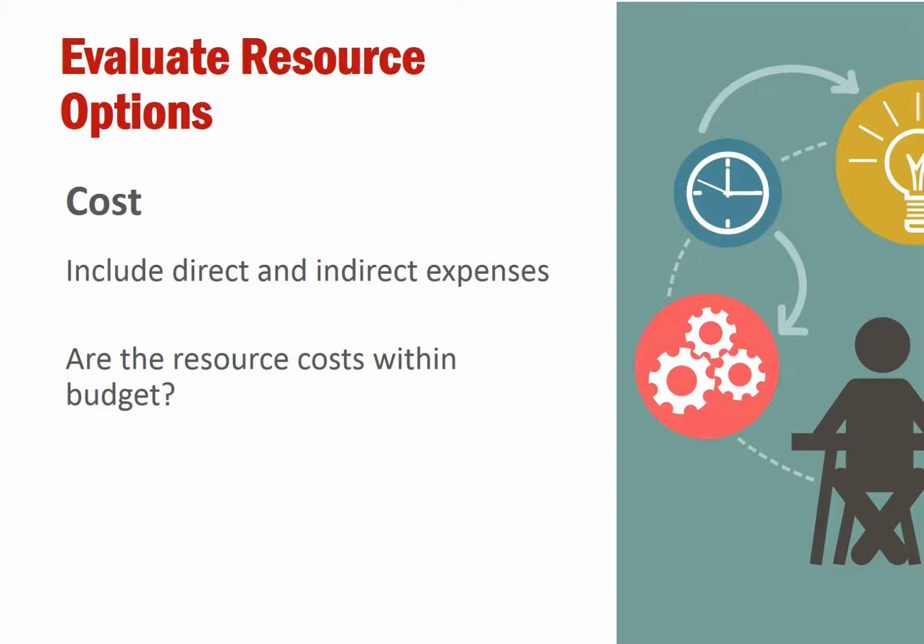For example, if you have budgetary concerns, you may go for a less expensive resource option over a very expensive resource. This happens when we need to select certain subject matter expertise. You may have a very skilled but expensive resource, or a resource who is averagely skilled and less expensive. If you have big budgetary concerns, you may have to go for the average skilled, less expensive resource.